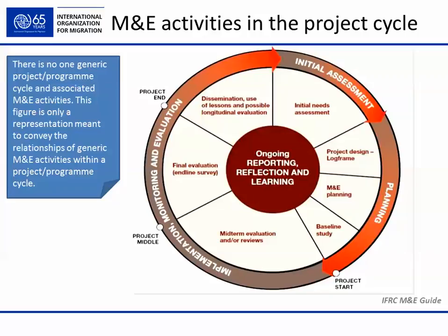If it's a large project, we may conduct midterm evaluation or reviews. At the end of the project, we may conduct final evaluation, and based on the results of the evaluation, disseminate and use lessons learned. To check the sustainability of the project initiative, we may conduct so-called ex-post evaluation.